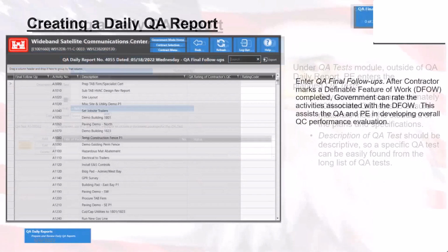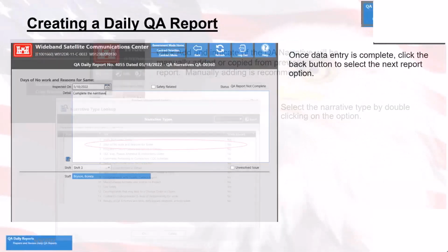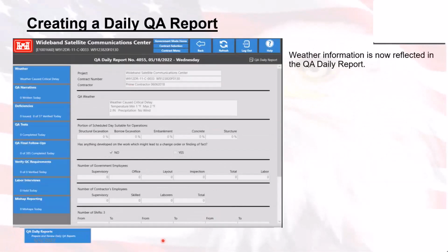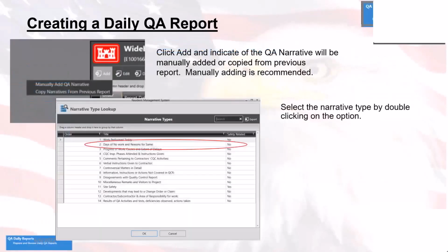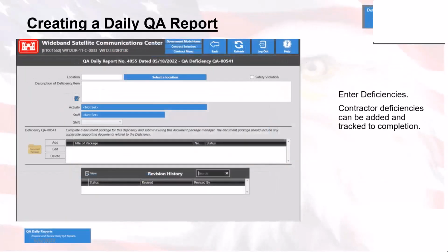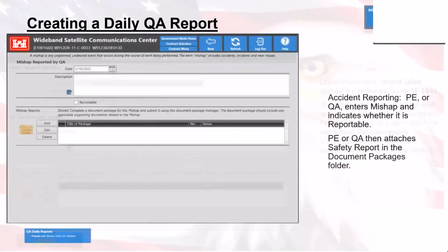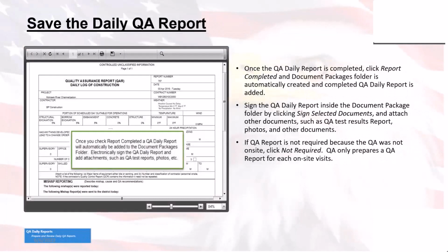That did not provide a pretty good view of it, but right back here at the base of all of this, down here is where the document package with all of this information will be stored. That's where the quality assurance record, the QAR, will be populated as well. Now, all of this will be completed by the government representative, and when it's completed, signed and submitted, it goes into the contract file. From the contract file, it can be reviewed, signed and submitted to the PCF.